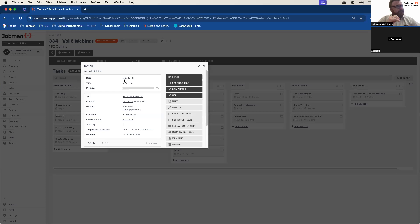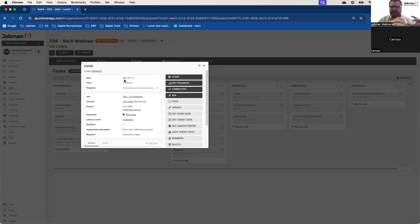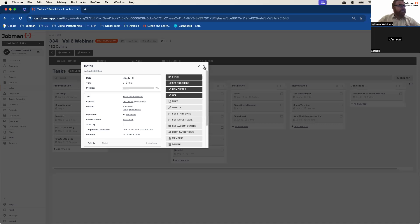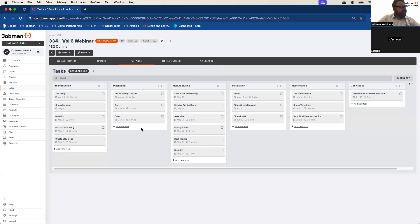The last thing that makes this system so incredible: whilst adding that time and doing that calculation, it's also taking stock of your capacity. So if my installation was capped out that week and I couldn't get this done, JobMan would extend these dates to start the job earlier to get it done by the 31st. It's so smart that when it works these days backwards, it tells me when I need to kick this off to get it done by that date, all things being equal. A couple of clicks and you've just solved job management and capacity management — the 99% reason why people come to a job management platform like this.